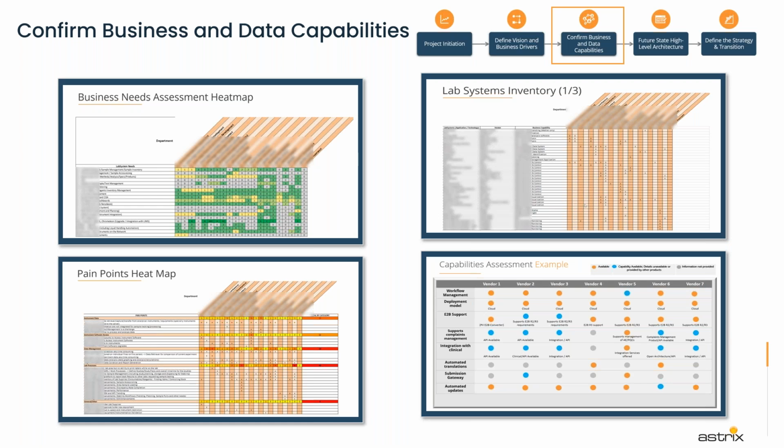So based on that, we define, for example, we may invite 7 different vendors for an RFI, where they will be evaluating these stages, they'll be presenting, they'll be doing some demo. Then based on that and scoring, we may be selecting 3 different vendors who can do an RFP, where they'll be having in some cases a POV or a POC phase where they implement our special use case. So we'll already have that prepared. And based on that, we select one vendor. I mean, it doesn't mean that one vendor does everything, but it's more like, for example, workflow management is one specific vendor, deployment is a different vendor, something like that.